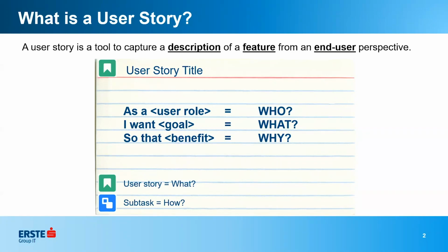When you start discussing how you think this is going to go, and when you're in refinement and you're thinking, no, this is the solution we're going to go with, you can either list those further down in the description of the user story if you're using Jira, or you can add them as subtasks or whatever. They just do not belong in the user story description of who, what, and why.